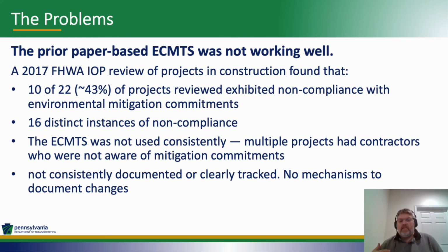Additionally, not everybody at the project site knew about the mitigation tracking system or the spreadsheet or the signature sheet. Not all individuals could locate it, and there were 3 projects that were reviewed that did not have a special provision requiring the ECMTS to be maintained, and that is something that the policy required. And even when they did have the spreadsheet, not all of the commitments that we had promised to do during the NEPA process appeared on it.